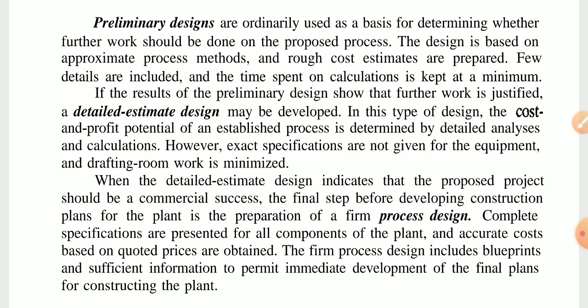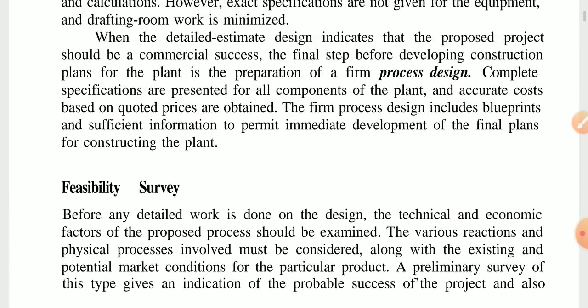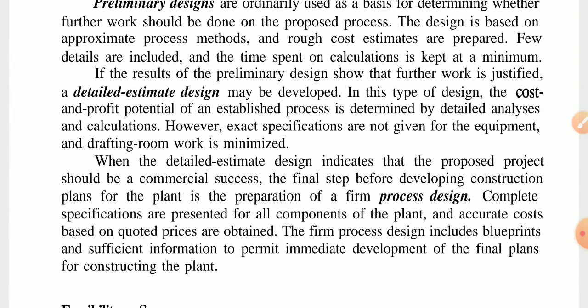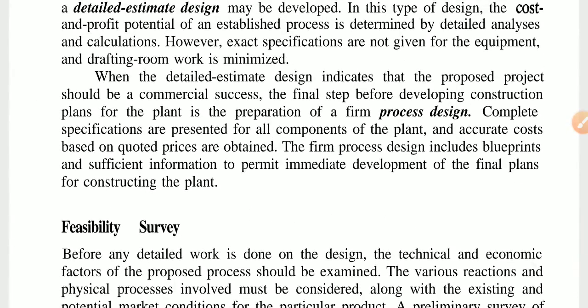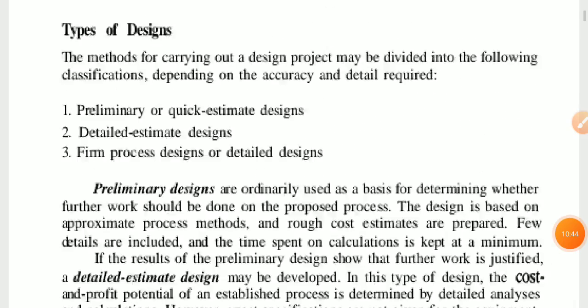When the detail estimate design indicates that the proposed project should be a commercial success, the final step before developing construction plans for the plant is the preparation of the film process design. Complete specifications are presented for all components of the plant, and accurate costs based on quoted prices are obtained. The film process design includes blueprints and sufficient information to permit immediate development of the final plans for construction of the plant.